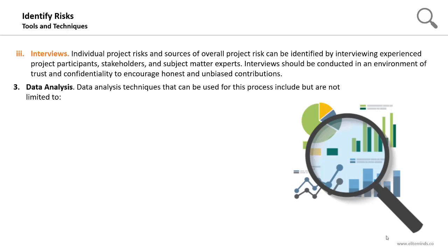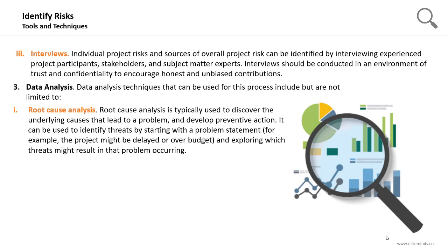Data analysis techniques can be very useful after applying the data gathering techniques, starting with the root cause analysis. It's typically used to discover the underlying causes that lead to a problem and develop preventive action. So usually we apply the root cause analysis in risks and defects management in order to identify or determine the underlying cause and develop accordingly preventive actions.